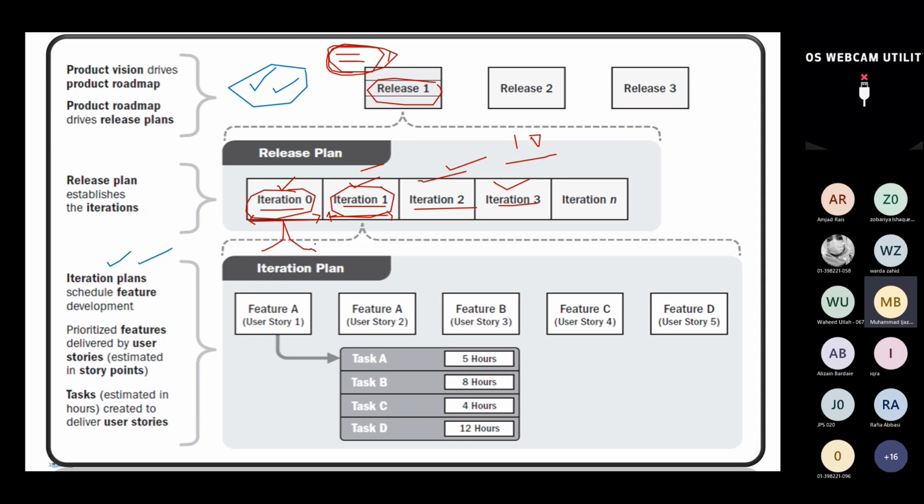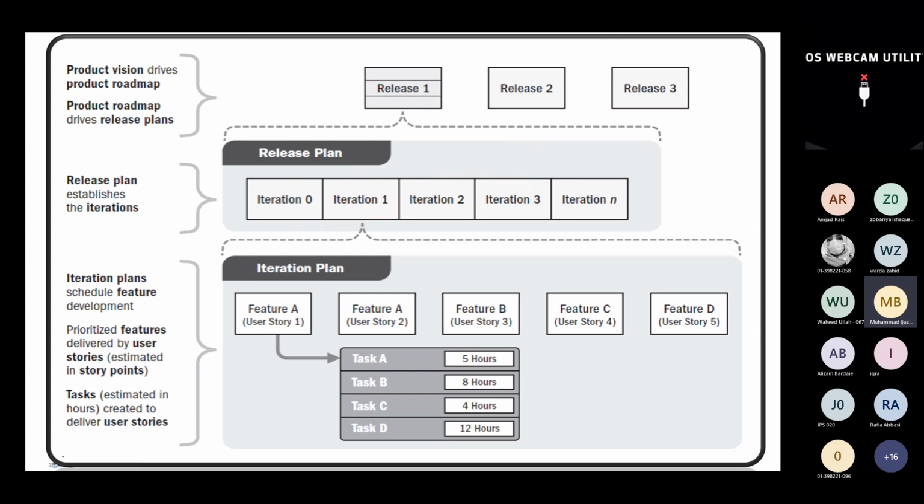Now look, at this stage, all of these approaches are incremental approaches. So it is quite possible that you might be able to prepare an iteration plan for iteration 0 only in the beginning, or iteration 1 only in the beginning. You may not be able to have a detailed plan of iterations that are far in the future, because your requirements would be changing continuously, isn't it?